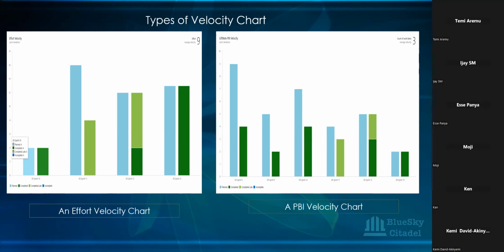That was what I was trying to explain, that even though the blue is there in your keynotes area to say incomplete, any work you don't complete in a particular sprint, you don't leave it in that sprint, do you? You carry it over to the next sprint. So that means as a Scrum Master, I have left some stories active in the sprint that has passed.